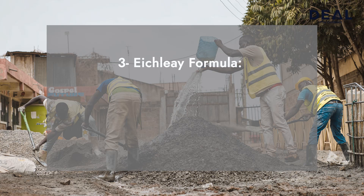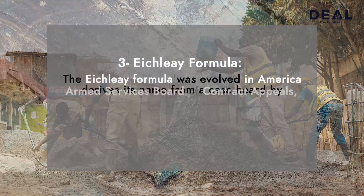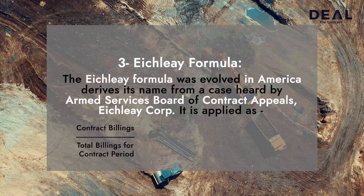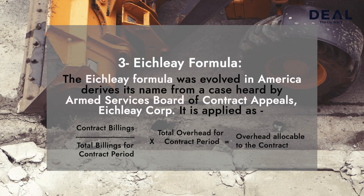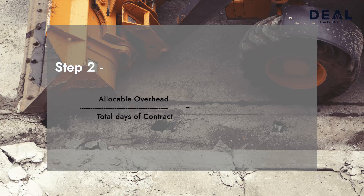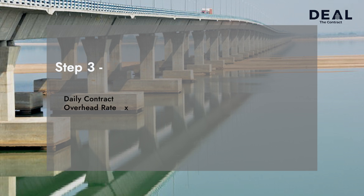3. Eichleay Formula: The Eichleay Formula was evolved in America and derives its name from a case heard by the Armed Services Board of Contract Appeals — Ashley Corporation. It is applied as follows. Step 1: Contract billings divided by total billings for the contract period, multiplied by total overhead for the contract period, equals overhead allocable to the contract. Step 2: Allocable overhead divided by total days of contract equals daily overhead rate. Step 3: Daily contract overhead rate multiplied by number of days of delay equals amount of unabsorbed overheads.